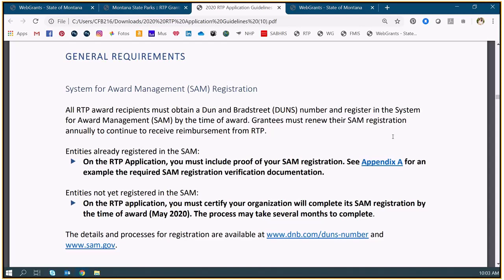Can I add something to this? Yes. You do not want to wait till the last minute to get this stuff figured out, because it takes weeks to get approved, and in some cases months. Expect 4 to 6 weeks for this to get ironed out. Drew just pointed out for folks on the phone, expect 4 to 6 weeks for this process. I've even seen that if you accidentally put in the wrong thing that doesn't match your IRS records, then you have to go back, and that can take months.